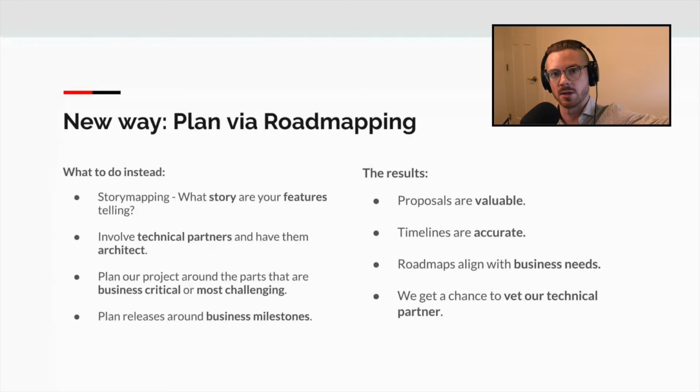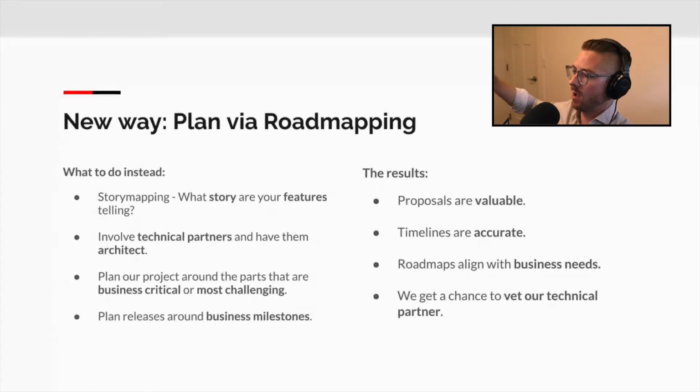That was last week. That was plenty sufficient for phase 2. In phase 3, we're going to list out all of the little things that can happen at login. As a user who is at login who doesn't have an account, I want to switch to sign up. As a user who is at login who can't remember their password, I want to go to a forgot password flow. As a user who is on login, who has put in their email and password, but put in the wrong password, I want to see an error message.